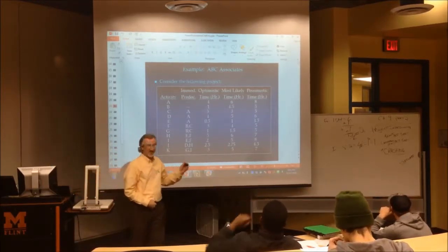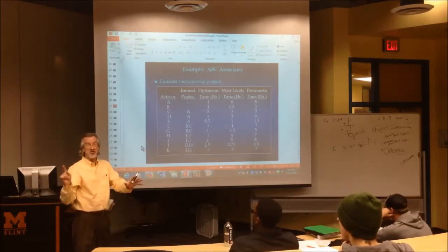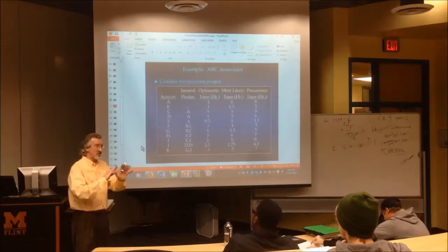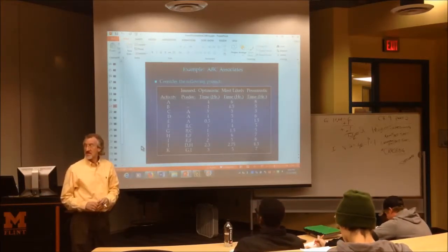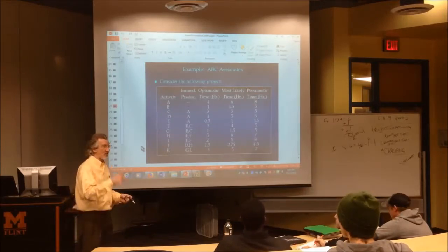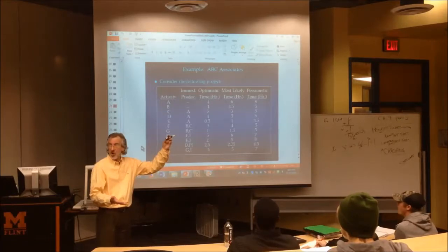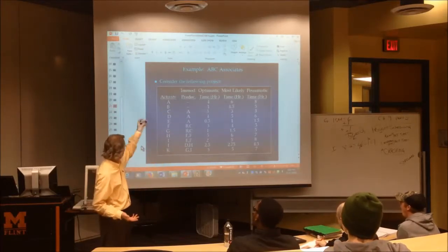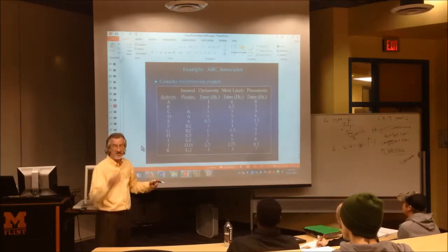Did I do what you said? No. Okay. Real quick, I want to save you time. You never, ever need to do the variances for every activity in any of the problems I can think of. It's very important, though, that you figure out what the critical activities are. Those are the ones you're going to need the variances for. Instead of spending all that time doing the variances for 9, 10 activities, just find the critical activities and just do those.